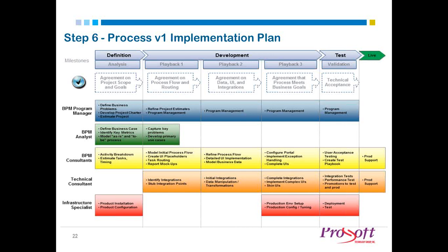Now, as far as development is concerned, that is closer to a typical IT agile-based methodology. You build a chunk of value in a month's time, and you have a playback. A playback is where everyone, including the process owner, reviews what has been built so far.